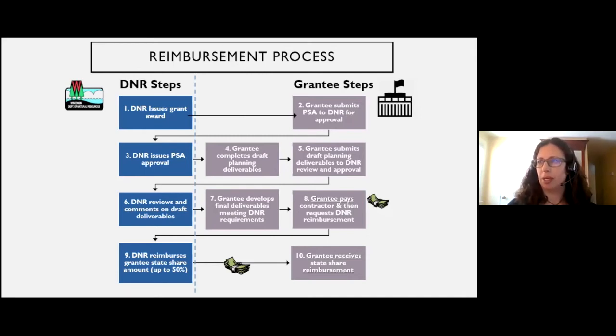partially. And third, grantees are required to pay back any partial reimbursements if they don't complete final approved deliverables within the grant period. So this means that we can't keep partial reimbursements for deliverables that aren't complete, and you can't keep partial reimbursements and deliverables that aren't approved.